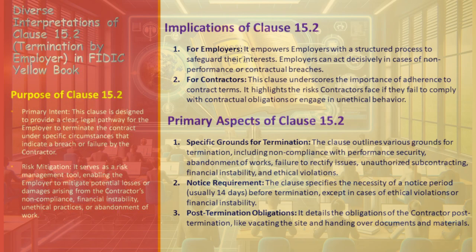For employers, Clause 15.2 offers a structured approach to protect their interests, providing the authority to take decisive action in situations of non-performance or contractual breaches. For contractors, it emphasizes the critical importance of adhering to contract terms, reminding them of the potential risks and consequences if they fail to fulfill contractual duties or engage in prohibited activities. Specific grounds for termination include non-compliance with performance security, abandoning the works, failing to rectify issues, unauthorized subcontracting, financial instability, and ethical violations.